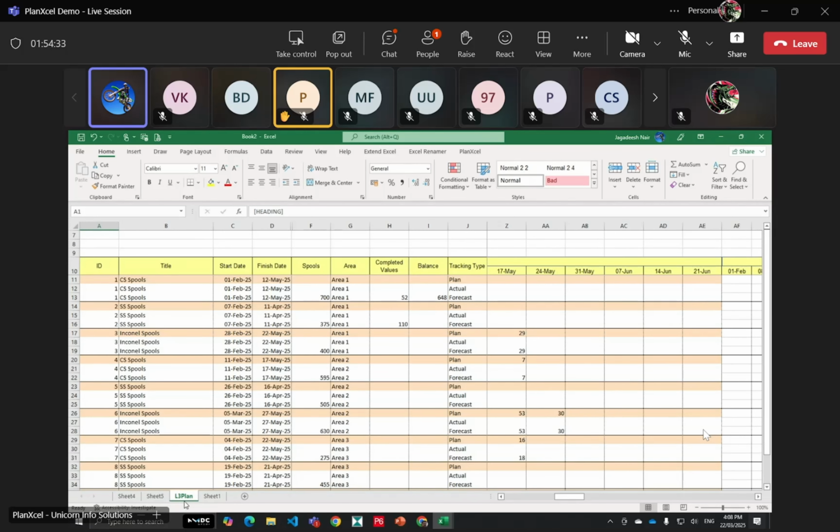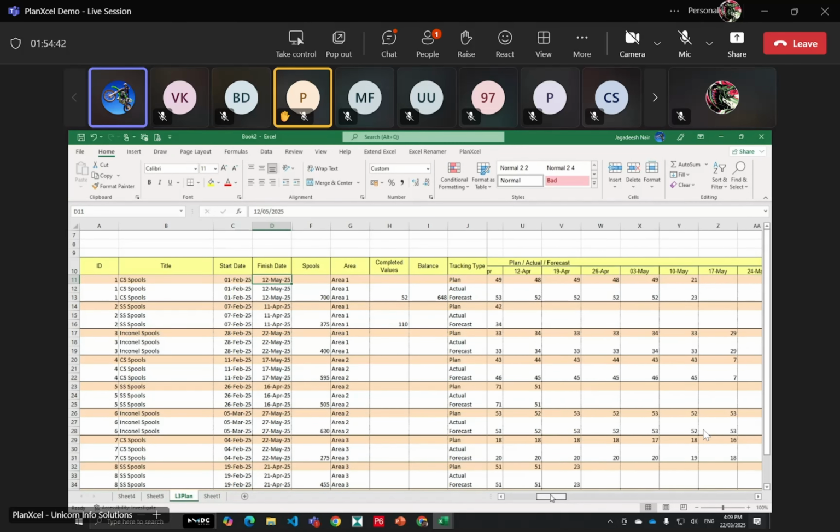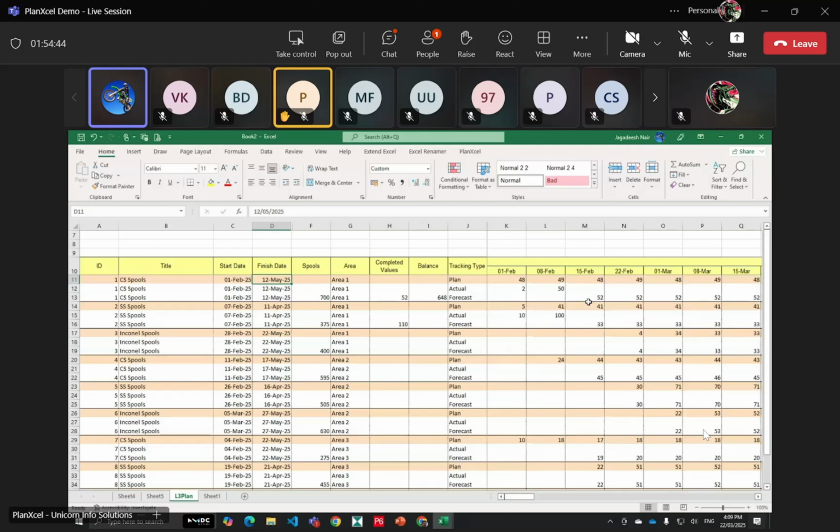So what will happen when you keep the finish date the same as your plan date as you move forward, is that the forecast will keep on increasing, and you can see the required rate. If it's not able to achieve properly, then you can immediately understand that this finish date is not viable, and it has to be extended further to normalize it and have an achievable target. This change of dates will serve you for updating your main schedule and to see what the downstream impact is.